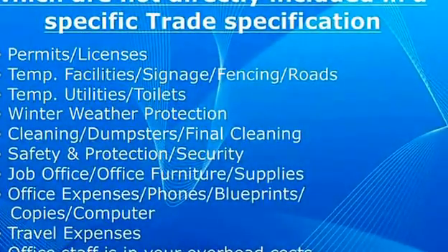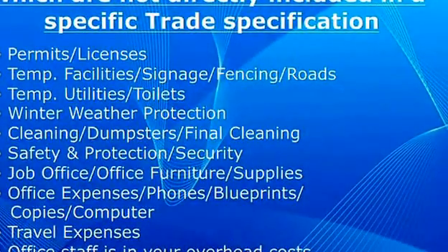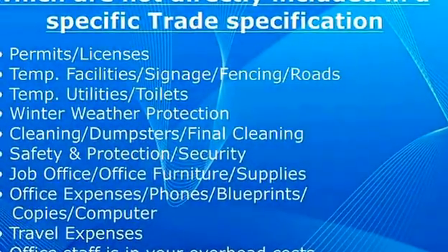Safety and protection and security. I just did a job downtown Cleveland. Had to have a security guard there from when we left in the evening till the next morning when we came in. It was a requirement in the contract from the owner, but we had to include the cost. So now you got to look at that option. Am I using a security company? Am I hiring police? What am I doing? So those are costs that you got to figure out to put into your general conditions.